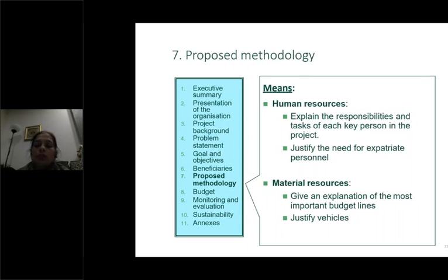budget. Those who have written a project know the budget is given in different heads. The main one is human resource. It can be a JRF, an SRF, a research assistant, a research associate, or a PDF, depending upon the nature of the work involved and the responsibilities. If I have a project that mainly involves going here and there to collect data, I don't need a JRF, I need a field worker. If it's a big project, I require a person to work in the lab, a person to assist them, or a person in accounts. So I need to identify the responsibilities, and depending upon that I should put the manpower budget.